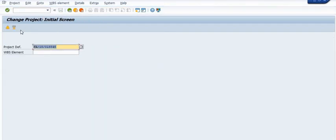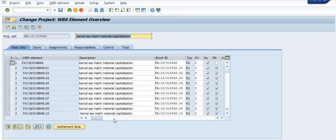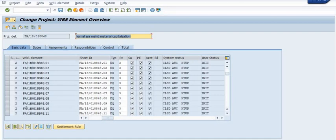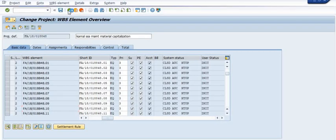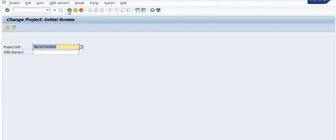In the WBS, you need to plan the material, then consume the material. The process is: plan the material first, do the transfer posting using movement type 415, then post the document using movement type 281 — goods issue against reservation — and finally all the material is consumed.